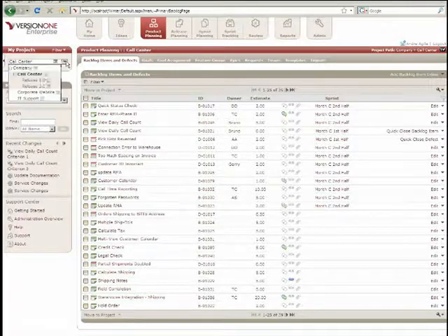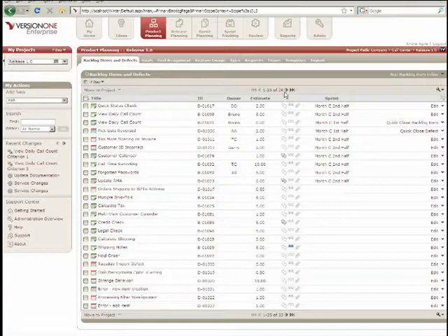So in version 1, for example, we have 2 releases under call center. When I drop down to release 1 in the project tree, notice now I'm down to 26 work items. So I have made that backlog smaller and more manageable. And then we go even further into our iterations. We see several iterations typically in a release, and several releases in a project. So that is the purpose: breaking that backlog smaller and smaller.